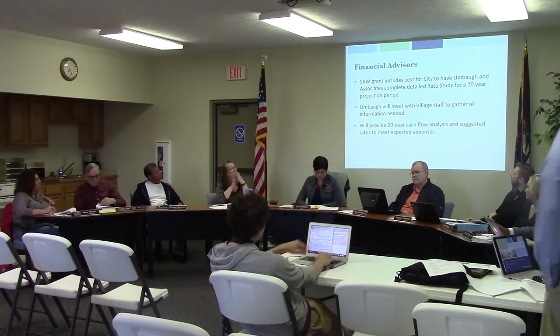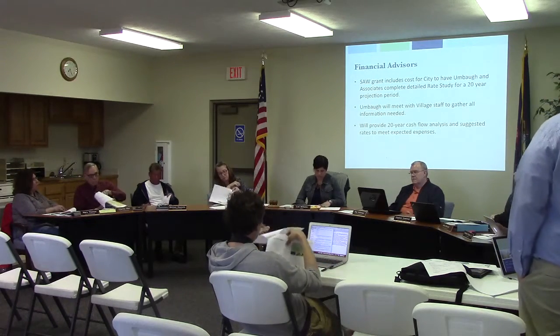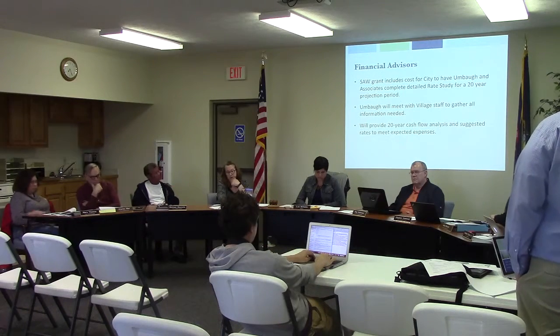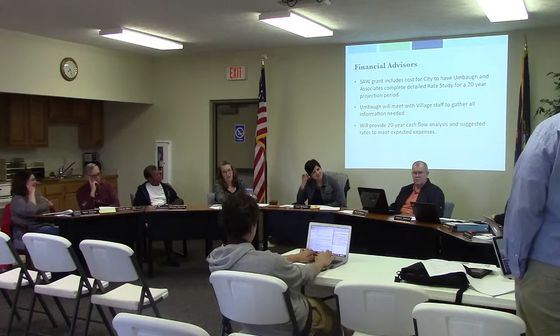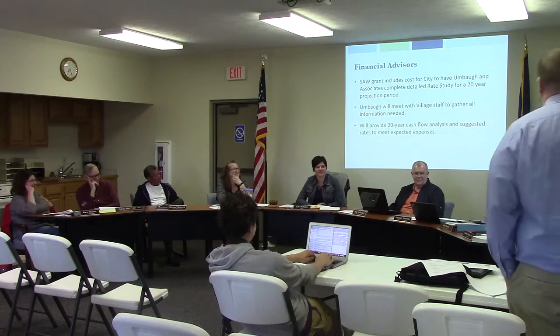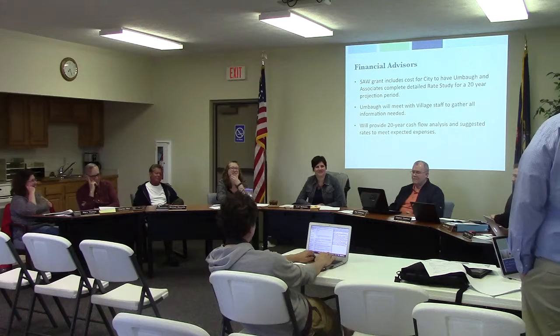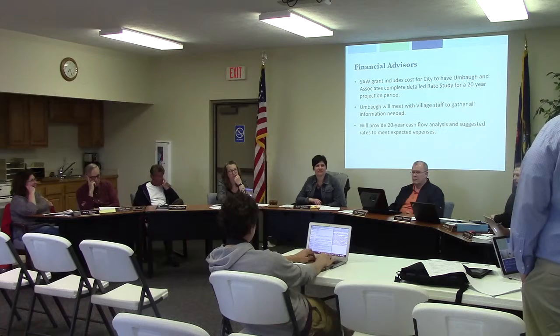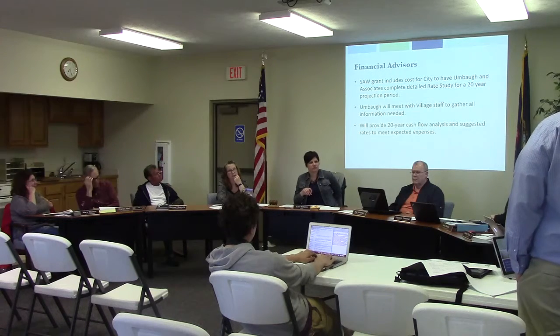Financial advisors. Umball has recently partnered with another company, so now they go by Baker Tilly. But our grant includes cost for them to do a rate study for the sanitary sewer system. This is about a $13,000 to $15,000 expenditure, but they will come in and go down through all the finances with Vester. I'm sure he's greatly looking forward to that. They'll talk about all the funding for the city's sanitary sewer system, any grants, any outstanding bills that they have, any bonds that have to be paid off. And they will go through all that.